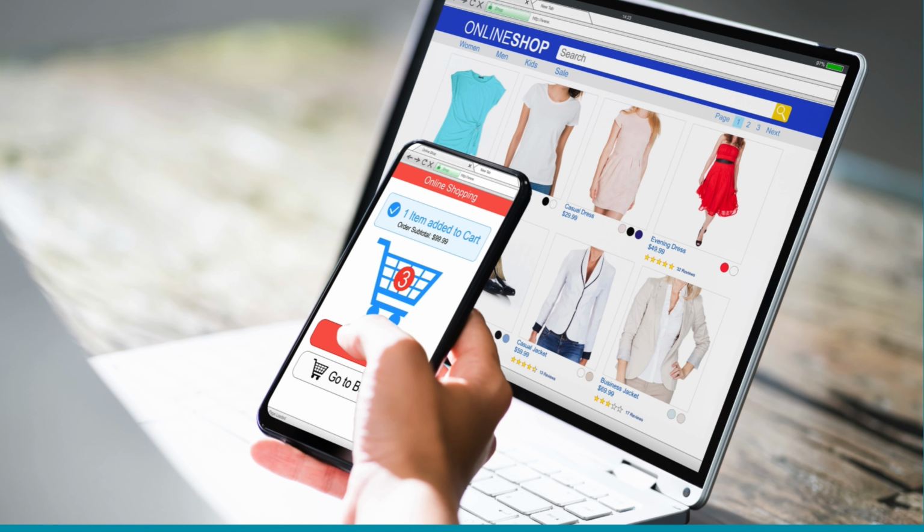Case 2. E-commerce platform launch. Developer hours were twice the plan. Analysis revealed feature creep. Action: froze scope, revised delivery plan. Outcome: launch delayed by 2 weeks, but saved the entire $300,000 marketing campaign.